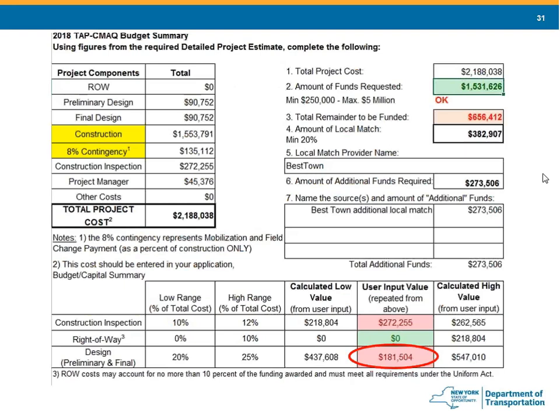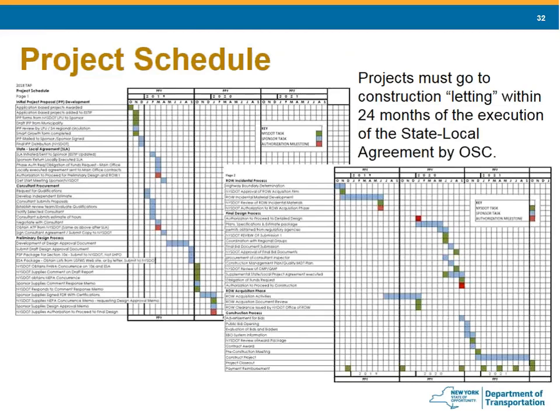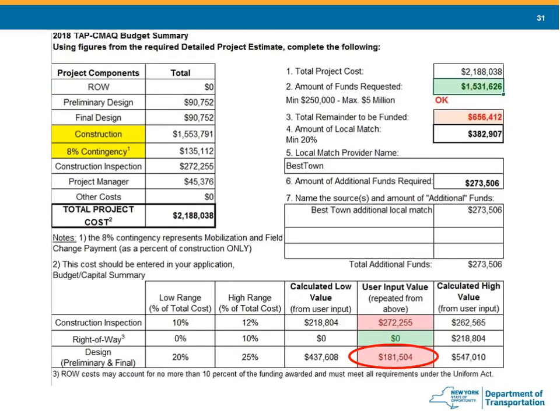Ensure you have the appropriate 20% qualifying match. TAP-CMAQ can reimburse up to 80% of eligible project costs — you must pay 100% of costs upfront and request reimbursement of 80% of eligible items. Right-of-way costs may account for no more than 10% of funding awarded and must meet all requirements under the Uniform Act. Describe all sources of other funds in the budget estimate. With approval from NYSDOT, eligible other funds may qualify as the local match. Areas where potential funding problems may become apparent will jump out to sponsors and reviewers — you should be able to explain large differences from the general norm.